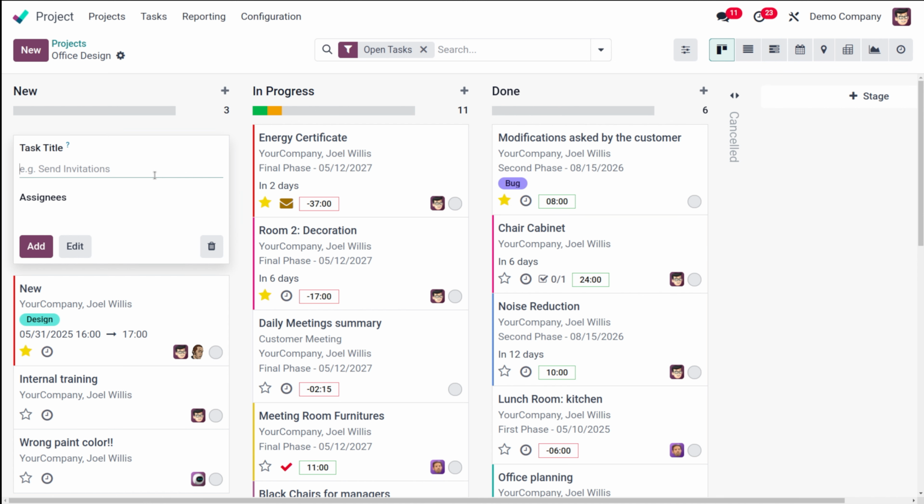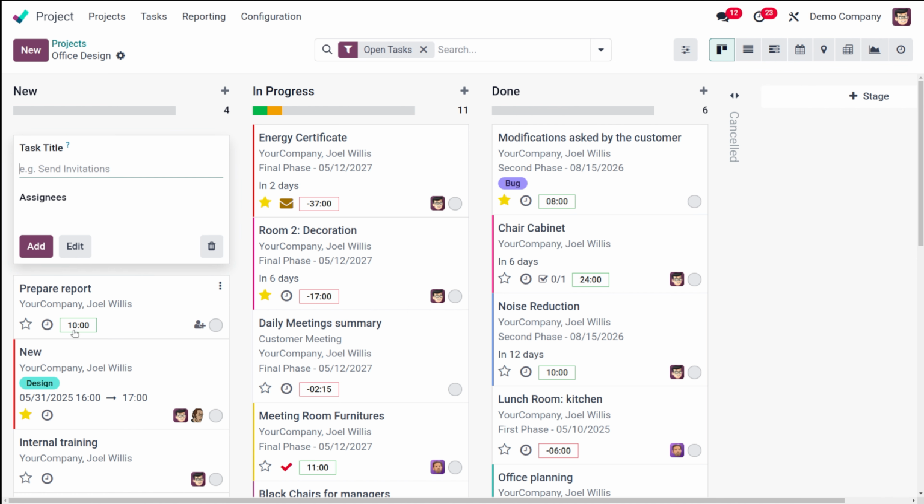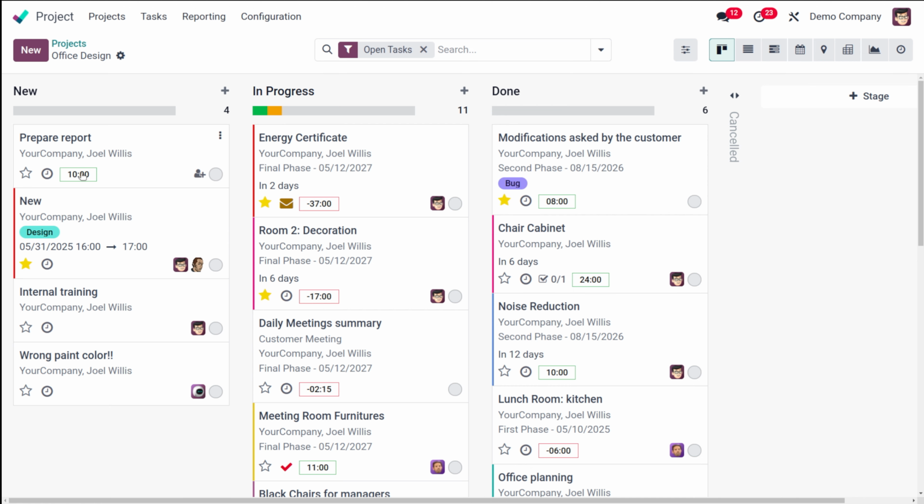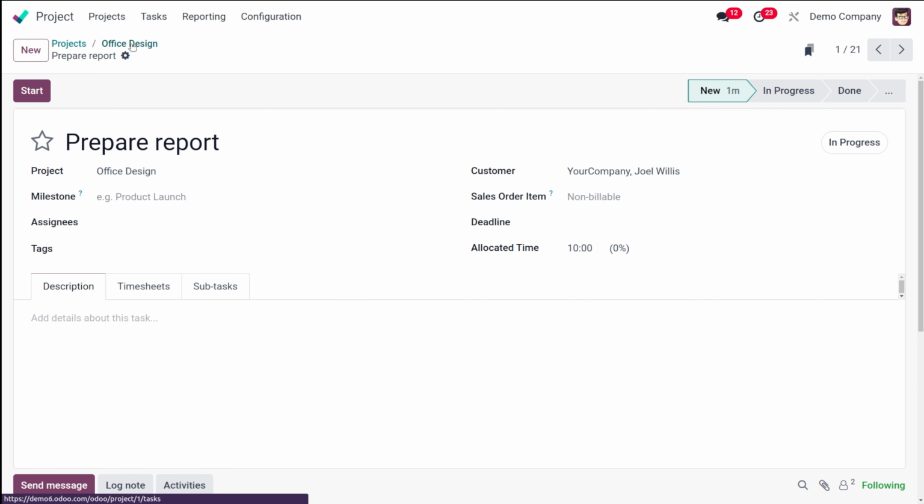So let me show you first of all how to add time. So I'm giving a title over here, which is prepare. That's the first title. Give a space, and if I'm putting 10h, which means this is the allocated time. So whatever the time is, you can specify it and use the letter H. Okay, I'll simply show you. So if you just add, you can see the 10 hours has been added over here. See, 10 hours is already added. Now let me show you how to add tags. Let's go back. Okay, we'll create a new one.